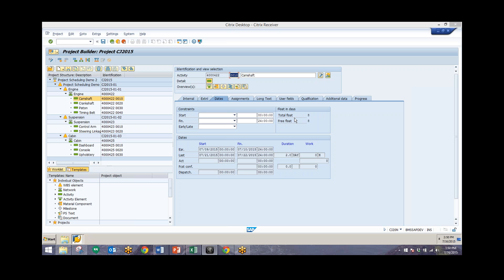Total float relates this particular activity to the network. Free float, on the other hand, is the interval by which you can shift the activity from its earliest start without affecting the earliest date of the succeeding activities — that's how much you can shift this activity without affecting the next one in line, which would be the crankshaft activity. Activities with total float smaller than or equal to zero are regarded as time critical, and these will be the critical paths for the networks and the project. We'll see those highlighted in red on the Gantt chart.